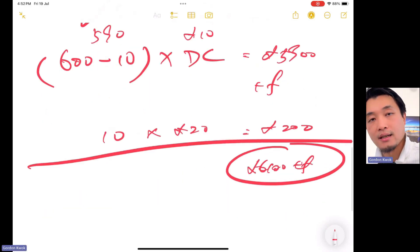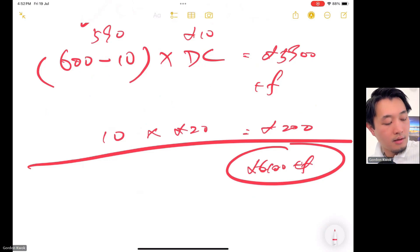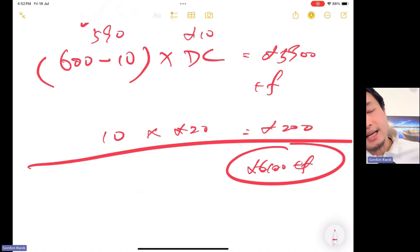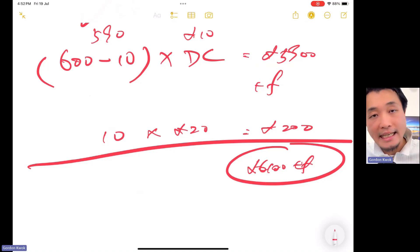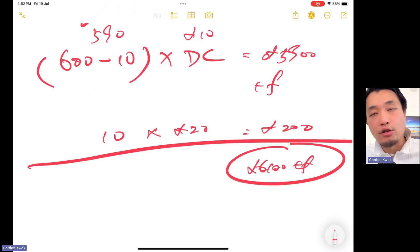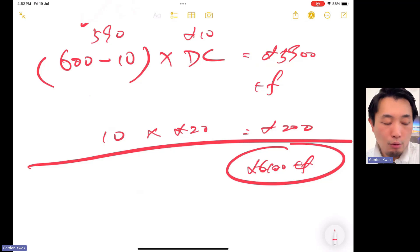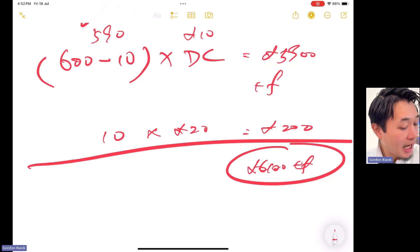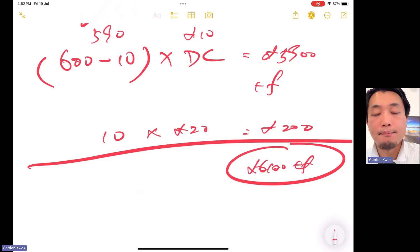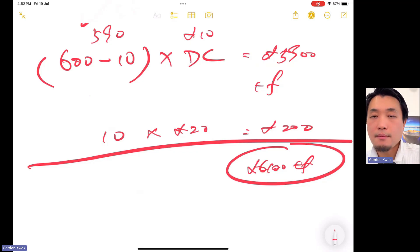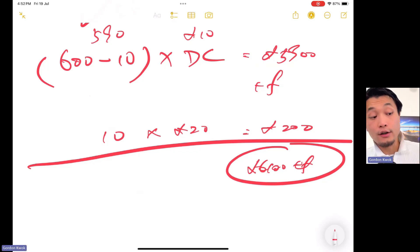That is how we understand clause 60.4 under Option B. The same applies to Option D, where BQ is used to calculate the target — the principle for determining whether a change in final total quantity is a compensation event remains the same.